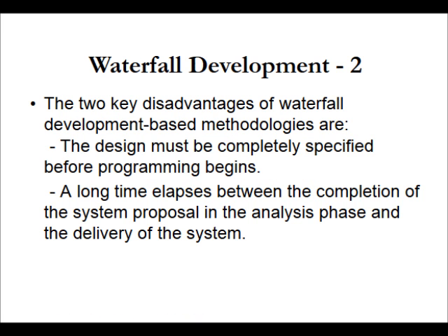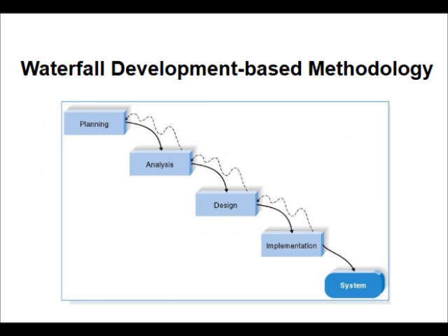The two key disadvantages of waterfall development methodologies are the design must be completely specified before the programming begins. A long time elapses between the completion of system proposal in the analysis phase and the delivery of the system. Waterfall development based methodologies have planning, analysis, design, implementation, and system. So these go in sequence. They don't overlap in case of waterfall methodologies.